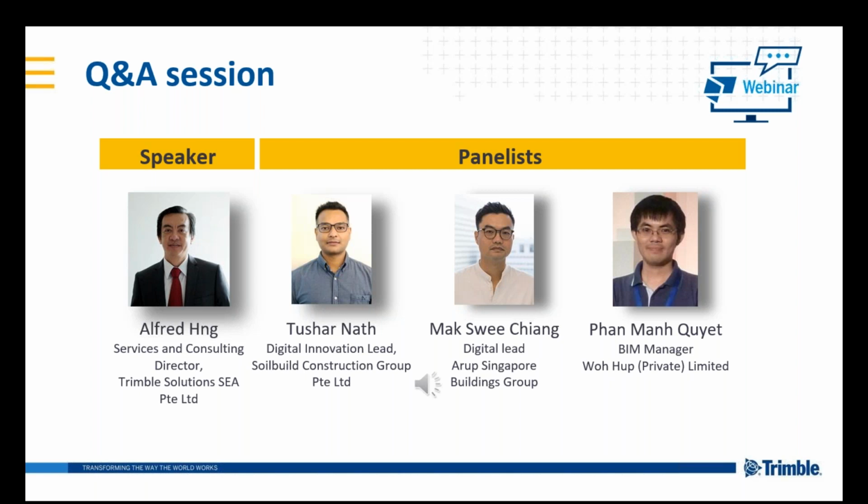Basically, there's a possibility, in our view, that we can extend the status tracking a bit more to look into the claim purposes. For example, at the very basic level, some claims are based on certain status. For a precaster like Excel, you probably make claims based on certain production status.